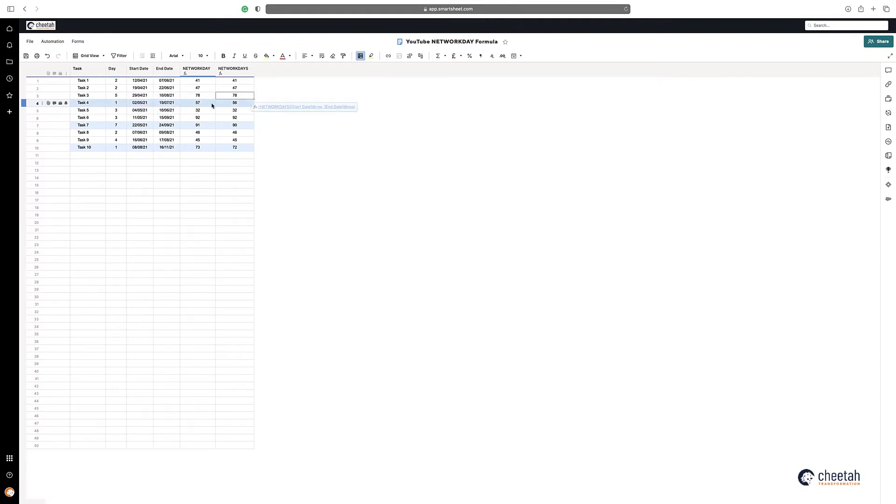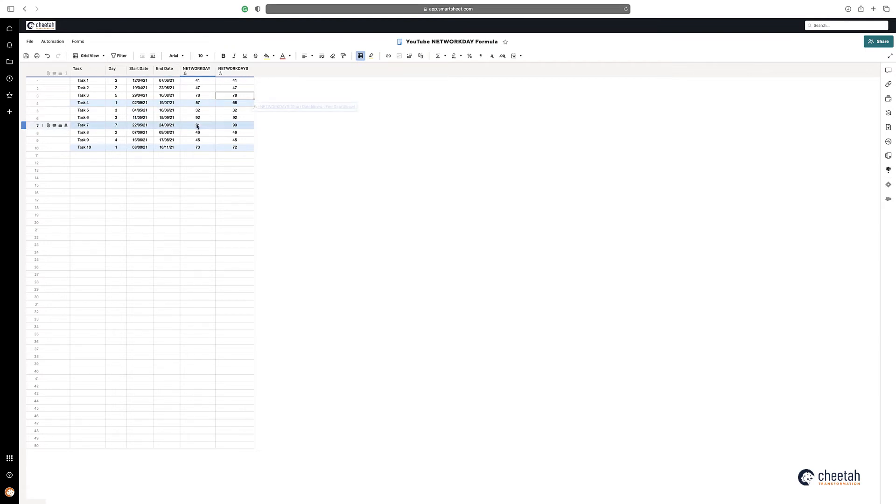And as you can see, for task 4, it's added a day on here because we started on a Sunday. On here again, it's added another day on because it started on a Saturday. And again here, it's added a day on because it started on a Sunday.